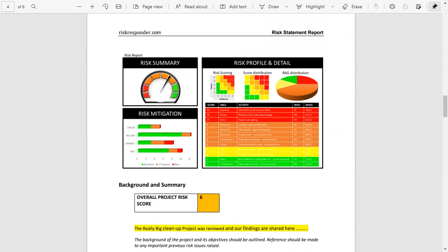If you go to page 433, it is titled S-Curve from Quantitative Cost Risk Analysis. So the overall state of the project from a risk perspective, where cost is concerned, are we likely to be on budget or not? That is one of the higher level thoughts. So we're not thinking about the EMV for EVM, earned value management for phase or for a task.